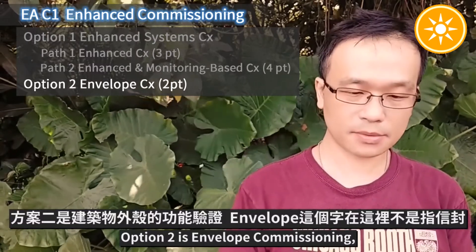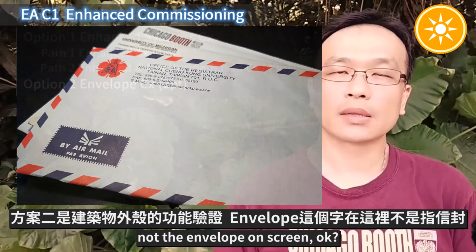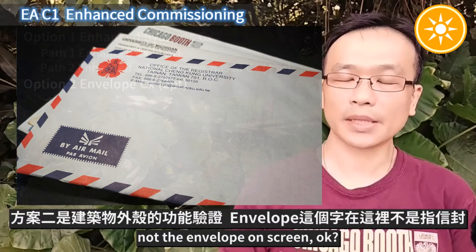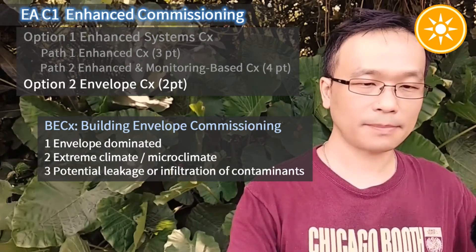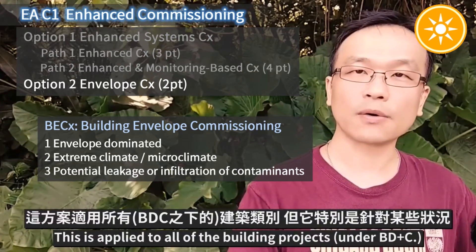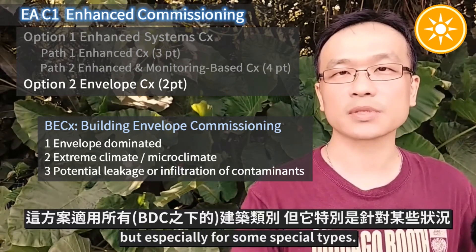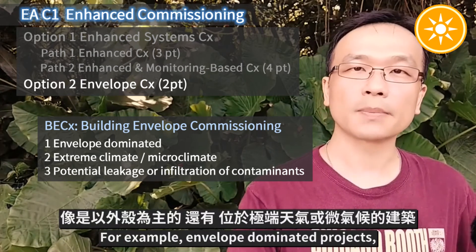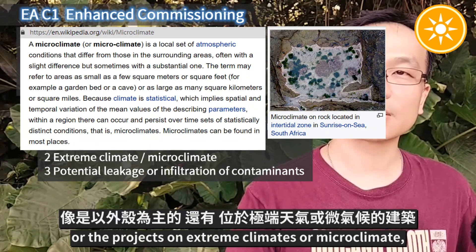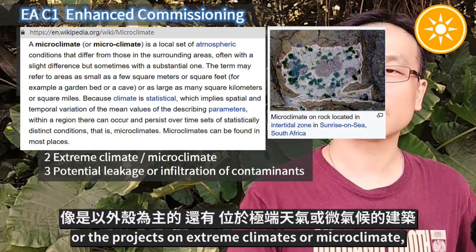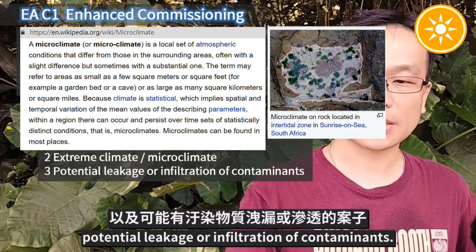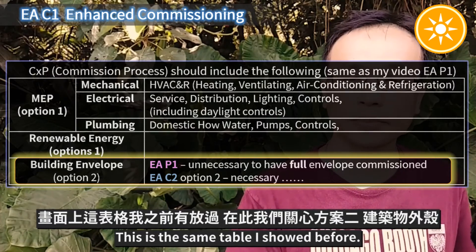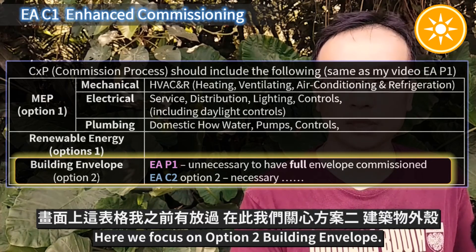Option two is Envelope Commissioning — not the envelope shown on screen. We focus on BECX, Building Envelope Commissioning. This applies to all building projects, but especially for special types such as envelope-dominated projects, projects in extreme climate or microclimate, and projects with potential leakage or infiltration of contaminants. This is the same table shown before, but here we focus on option two, the building envelope.